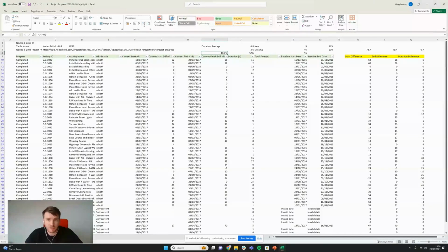So based on this, I can say quite safely that if the scope change is being driven by us, then it might be wise to have certain buffer periods in the program to absorb this level of scope change. If it's driven by someone else, well, that is the decision of the commercial director.